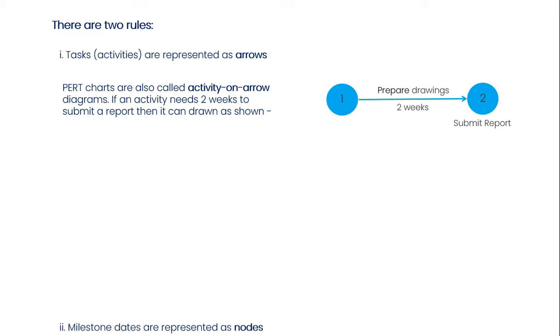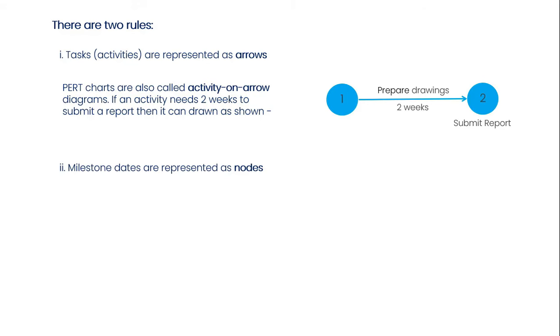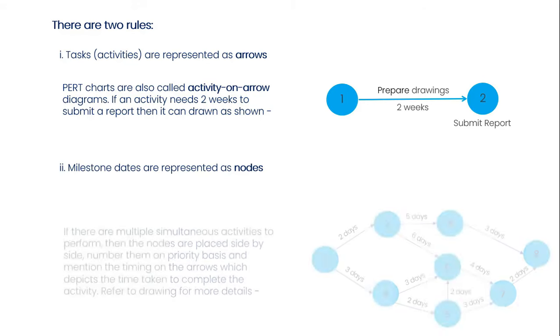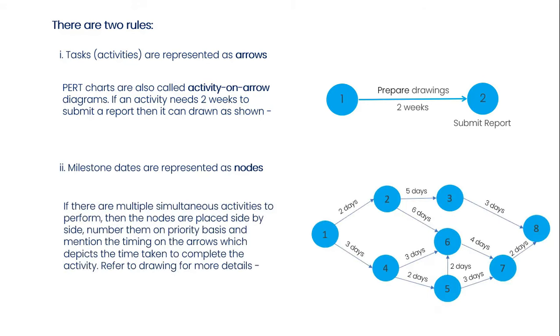The second rule is milestone dates are represented as nodes. If there are multiple simultaneous activities to perform, then the nodes are placed side by side. You can see the number of them on a priority basis and mention the timing on the arrows, which depicts the time taken to complete the activity. Refer to this drawing for more details.